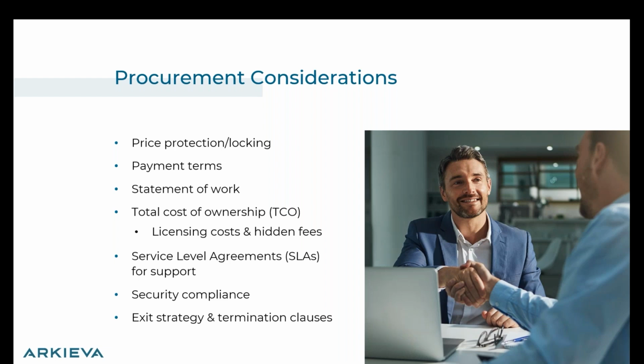So these things, especially with procurement and legal teams, because there are some legal people who will be involved here to try to write the different parts of the contract, can easily take, if you're lucky, 1 month, and if you're unlucky, 6 months. So knowing your company and how long procurement and legal take within your company is important so that you can put that in the timeline as you go through this part of the process.